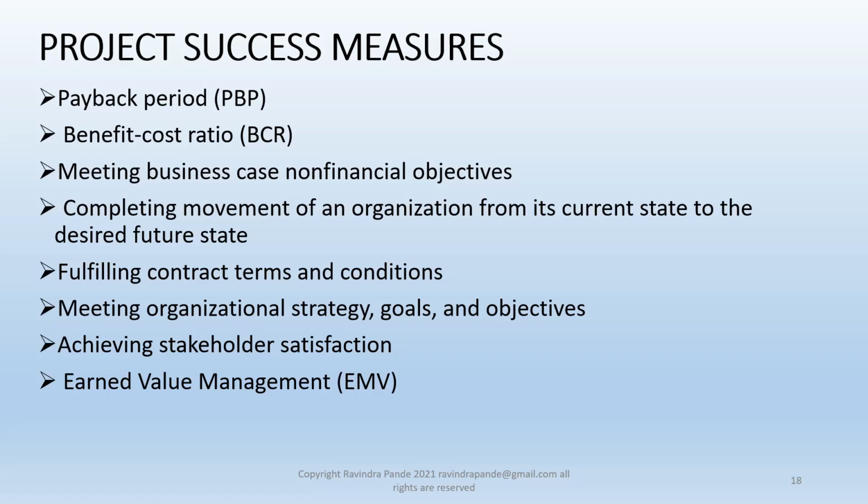In terms of earned value management, this is a new modern concept adopted or invented, as we might say, by PMI, the Project Management Institute, with the help of Carnegie Mellon. They developed a thought process called earned value management. Whatever you earn is your progress. Whatever you delivered, this doesn't mean payment received, but whatever you deliver and get a certificate of completion, that's your earned value. Let's say you are halfway through a project and you have just delivered 40% of the goods as we planned.